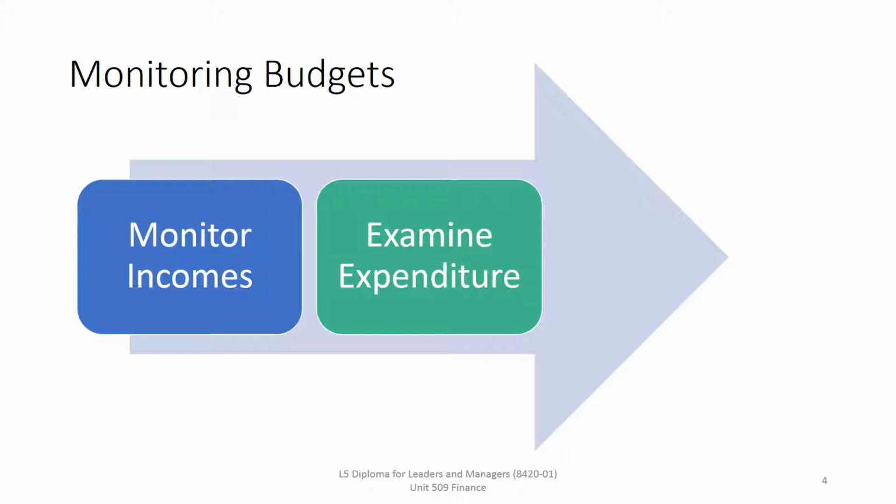And in considering the amount of expenditure, we'll be looking at the actual and the notional. We'll be looking at all the costs incurred and attributing them to specific tasks or items. And in doing that, we'll need to be comparing the expected costs against actual costs for different resources. Are the costs more or less than expected? Are we on target for that? Are we going to be able to change the notional spend?